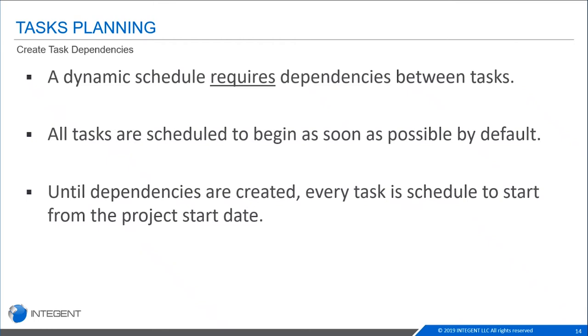In the sample schedule I just pulled up, all of my tasks, since they don't have any dependencies or relationships right now, are all set to start at that project start date as well. So until those dependencies are created, everything is scheduled from the project start.